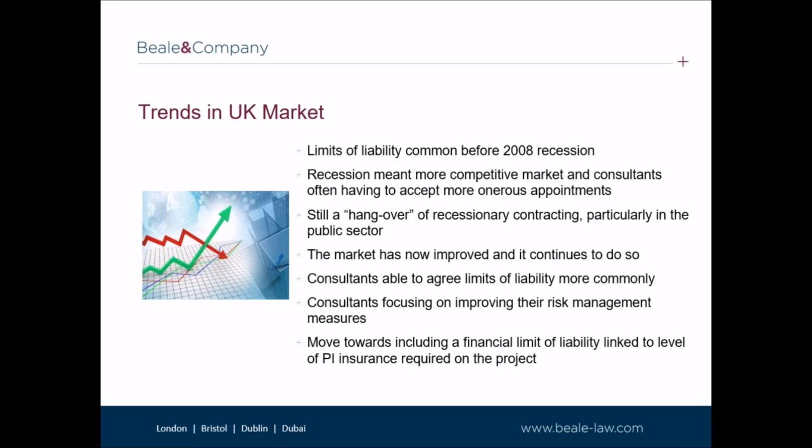Nevertheless, the market has now improved and it continues to do so. Even though limitation and exclusion clauses remain less common than prior to the recession, in most cases, consultants are now able to agree limits of liability more commonly and are generally focusing on improving their risk management measures. Another trend is a move towards including a financial limit of liability, which is linked to the level of professional indemnity insurance required on the project, rather than by the fee. This is perhaps following the Ampleforth case, which I discussed earlier in this webinar.